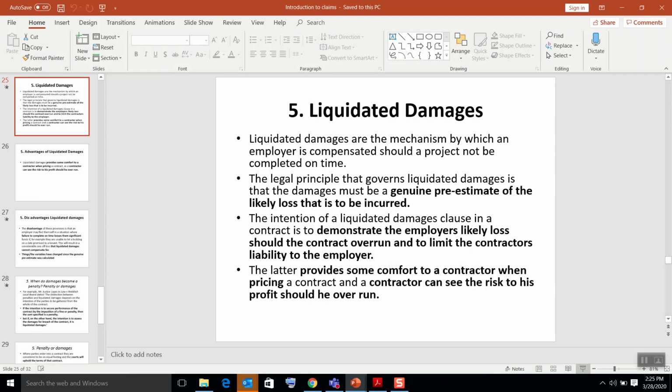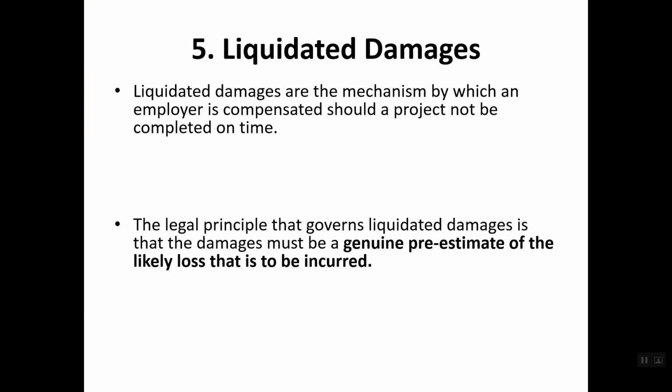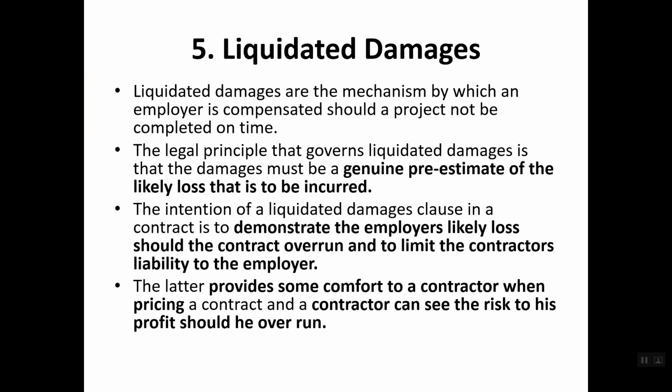Liquidated damages. I think we have discussed liquidated damages in the class as well. It is a kind of compensation by which you, as the employer, can be compensated by the contractor. It is not a penalty or an additional charge. It is just because he has delayed your project. Because of that, you will not receive your project on time as you have planned. Because of not receiving your project completion as per your plan, you will be losing some other benefits that you were supposed to achieve.